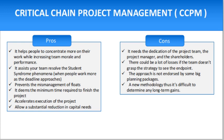The disadvantages of CCPM include: it requires the dedication of the project team, the project manager, and the stakeholders. There could be significant losses if the team doesn't grasp the strategy to see the end point. The approach is not endorsed by some major planning packages. And as a new methodology, it is difficult to determine any long-term gains.